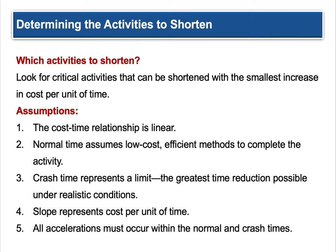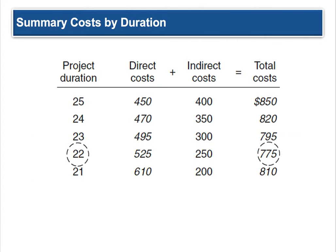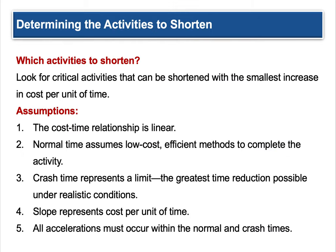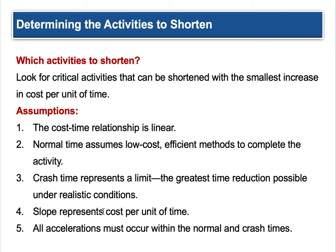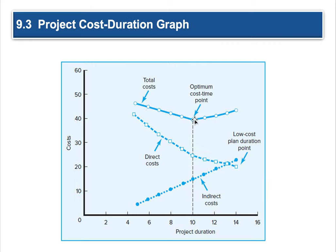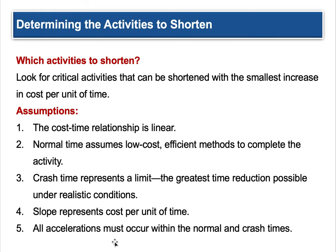You have to make some assumptions: the cost-time relationship is linear. Normal time assumes low-cost, efficient methods to complete the activity. Crash time represents a limit — the greatest time reduction possible under realistic conditions. Ideally you would end at this low-cost point; that is where you would crash it. The slope represents cost per unit of time. You look at the slope: costs are coming down, it bottoms out at the low point, then costs start going up. Graphs are your friend — they tell a story just by looking at them. All accelerations must occur within normal and crash time.